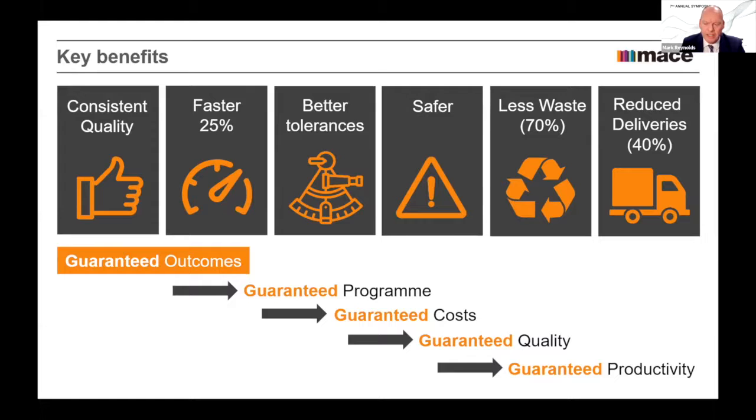But what we are getting, the speed, and if we are a developer, we're saving, let's typically take a £100 million building, around about £1.5 million in finance. And if it's a build to rent facility, we're getting new revenue of around about 2.4 to 3.6 million pounds earlier. So it's new revenue we never had.